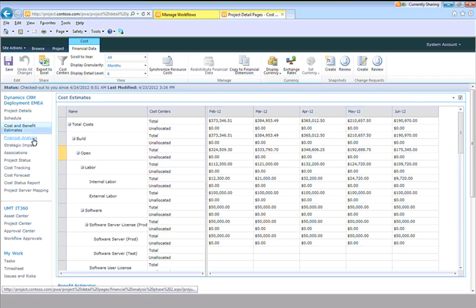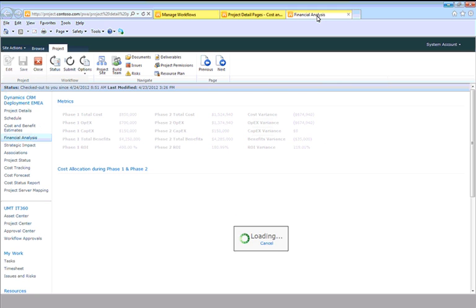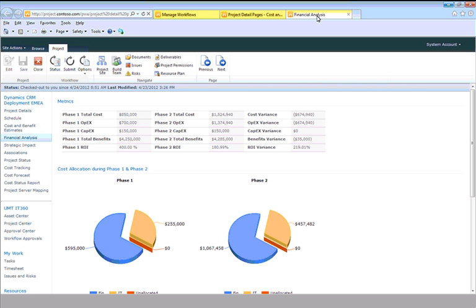Reporting is also key, so I'm actually going to just bring up a report as I'm talking. Let's see if this generated. What this report is showing, as it builds out, is the different financial information as we progress through multi-phase approvals of the project. So here's our phase 1 snapshot that I was talking about earlier, and we're seeing the costs and other metrics related to that. As we moved through the detailed planning decision point into execution, we also took another snapshot, and we can see the variance between both our phase 1 estimates and our phase 2 estimates.